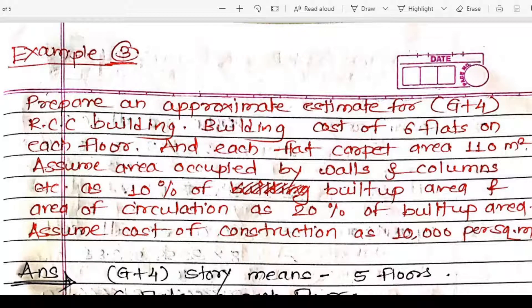Hello everyone, welcome to the next session of quantity survey estimation and valuation. In the last lecture we started problems on approximate estimation and we will continue with these. Now we will see another problem: prepare an approximate estimate for a G plus 4 RCC building with 6 flats on each floor and each flat having a carpet area of 110 square meters.